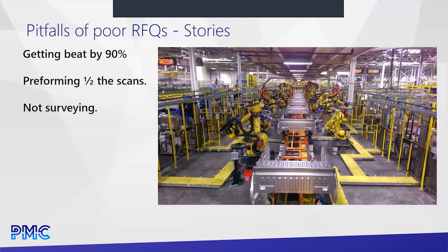And what ended up happening, and what we bid, is per the specification, the requirement was to scan every level of a paint shop. It was to do it using terrestrial laser scanners. It was to capture all the information, both inside and outside of the equipment, and again, on all levels. The bid that ended up winning was for mobile scanning with no secondary control or survey control, and they only had accounted for a single floor.